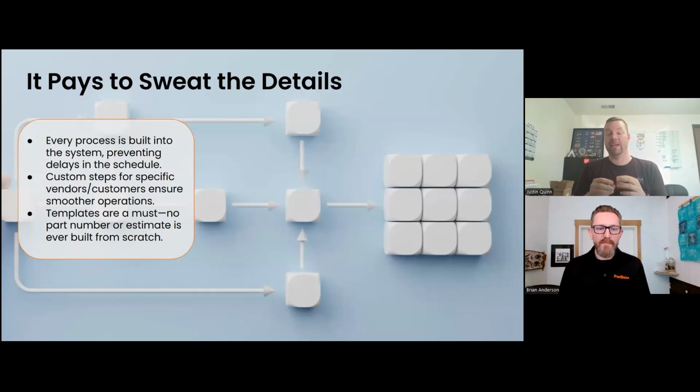I honestly don't think I even met with the team. I just made the change in ProShop, and then said, "Hey, for this customer, we add these steps no matter what." So this literally was probably a 5 minute fix where I went to our operation configuration table inside ProShop and I added a new line item, and then I trained my order entry person that anytime this customer shows up, we add these couple steps, and you just click the box and they're there.